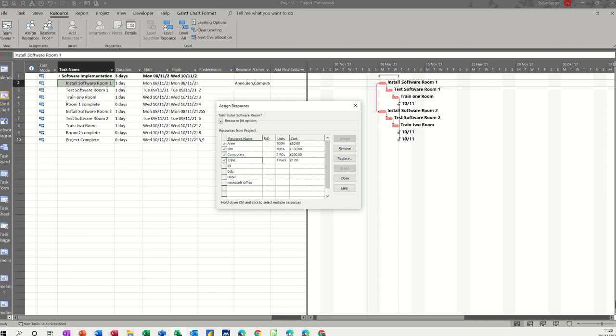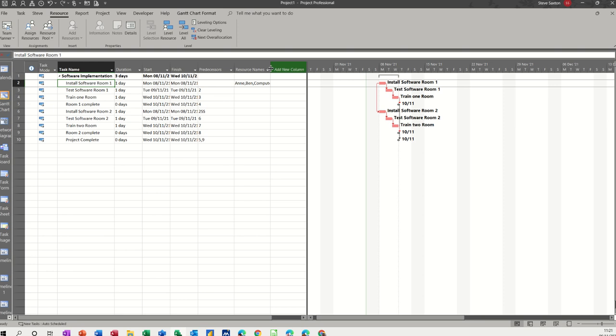So what I need to not do is type it there. I just over typed in the wrong place, so I'll type that back in. I need to get into here and go 2/hr. That's gone up to 16 because there's 8 hours and there's 2 of them, 16. And then Microsoft Office, I need 2 of them. Assign 2 licenses, so that should go up because it's £100 per use. Now I'll just close this for a minute because all that stuff that I've just done there is in this column as well.